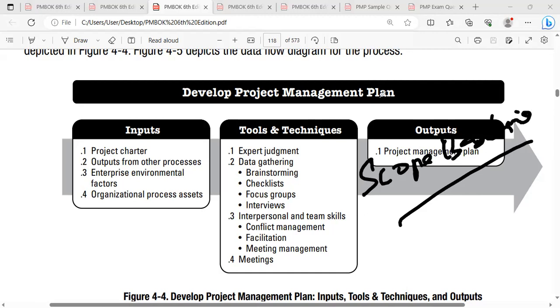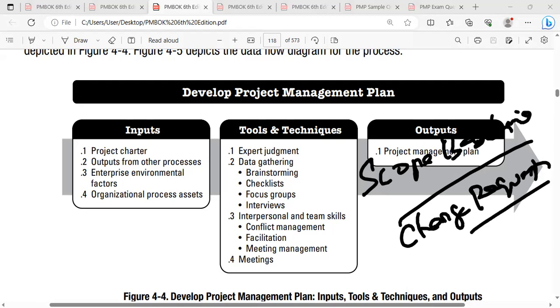After the baseline is integrated with other documents, it's ready to go to the execution people. So can we do any kind of changes here? You can do the changes by pushing a change request. If you want to add the scope or omit the scope, you have to push the change request, because this document has now become a formal document. Previously, it was an informal document.